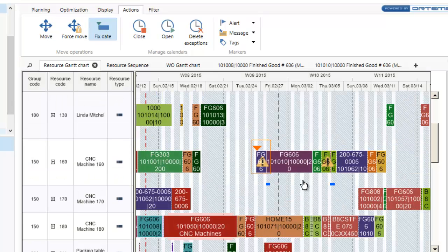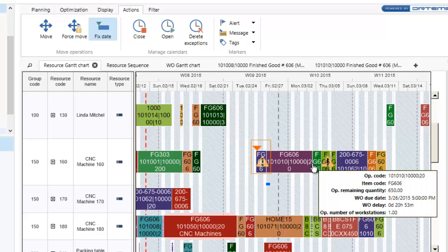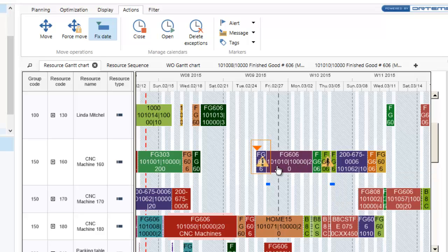And we should see, it happened pretty fast, but what it is basically doing is bringing these other activities forward because we're more efficient. Oh, it's on this weekend. We're bringing these activities forward because it's more efficient, because this machine center is open during that period of time. So that's called opening a period.